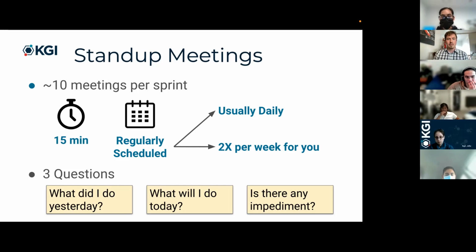Try to make sure that they are regularly scheduled. Again, usually this is a daily thing, so that you start the day knowing what you need to do to be a contributor. But that's not realistic here. So what I'm thinking is 2 times per week, and that's including time that you had for your lecture. So on Monday, you'll know, hey, today you all met, right? So this was your first stand-up.